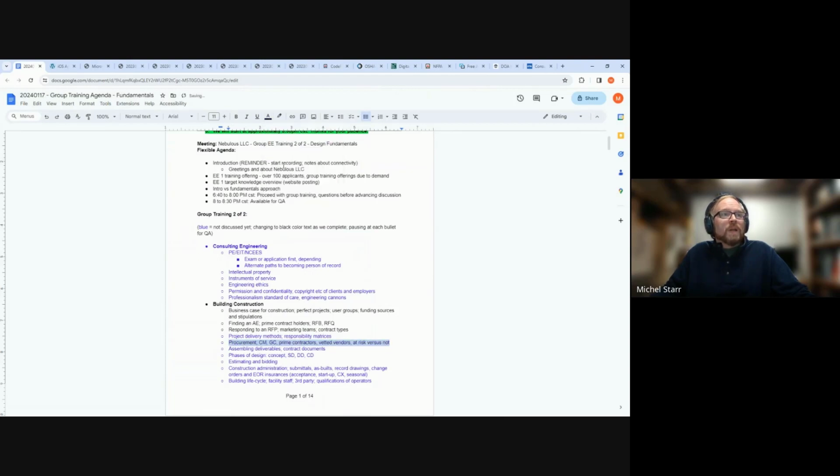So the procurement is the activity of taking the drawings and the specifications and actually getting the stuff built. So there are these ways to get that done, and with that usually comes gaps in design. Maybe the contractor is going to do part of the design, maybe the branch panel board schedules, because it might be sensible for them to do that.